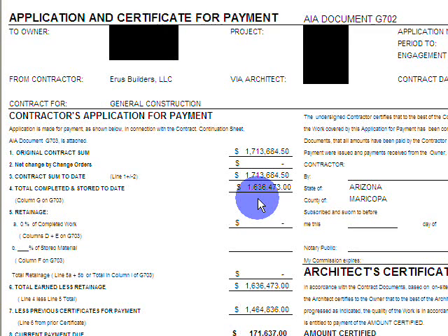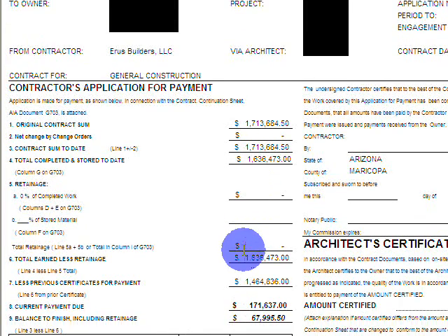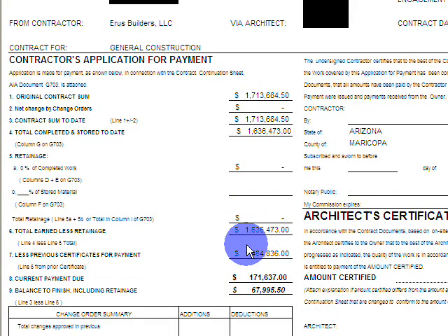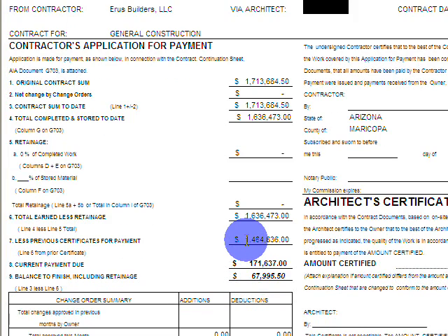They would then send out an inspector that we would meet with on the job site to go over that particular month's work completed. And I'm going to again show you that on the backup sheet. Then panning down, you can see that we've got an item here for retainage. We had no retainage held on this project as it is a residential project, and typically you don't have retainage on residential projects.